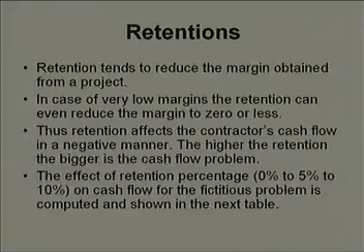And when are you getting your money back? After 6 months of practical completion. That means at the end of month 16. When the retention money is 5%, you will be getting back your 55 lakhs at the end of month 16. When the retention money is 10%, you will be getting paid 110 lakhs at the end of month 16. When there is no retention money, you won't get any money at the end of month 16.